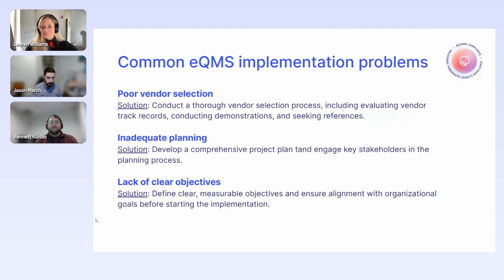So if you have existing CAPA workflows, complaint workflows, ensure that you have folks designated to be a part of the eQMS implementation project to focus on these. Now, all of these pieces don't need to happen at once. You need a proper plan in place and clear objectives for how you're achieving success throughout the plan. Your first set is making sure your validation's in line. Your second set perhaps a core set of SOPs, right? So just make sure you're really looking at those throughout project plans from the planning perspective.